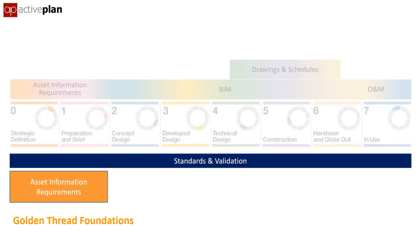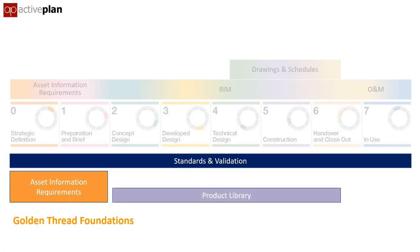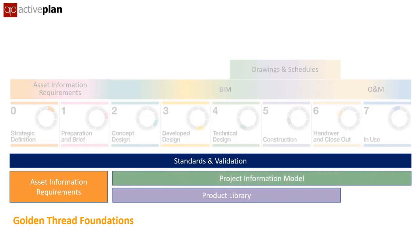A product library application can manage the product data used on a project, and is used to create the project information model, which is progressively updated. The O&M is an output from the PIM and can be generated at any stage, and the PIM transforms into an asset information model for long-term management and updating.